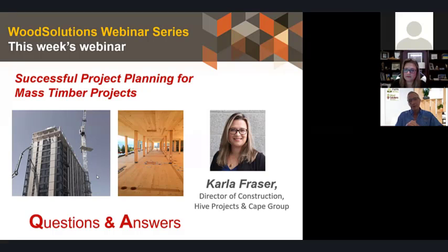It was interesting, early on in your presentation, you spoke about the shop drawings and production timelines, how they get blown out in terms of the assumptions. Yeah, I was surprised with the shop drawing one in particular, how long that took for sign off. Well, that's the thing. Because we have so many iterations, because it's integrated project delivery, we may have another iteration because the client, this is the time where you can make changes. And we go through the shop drawing process and we look at it and go, oh, this is not exactly what we were looking for. And now let's start the process again. So you need to allocate enough time for that process. Hugely beneficial though, because then you end up with exactly what you planned on putting in.